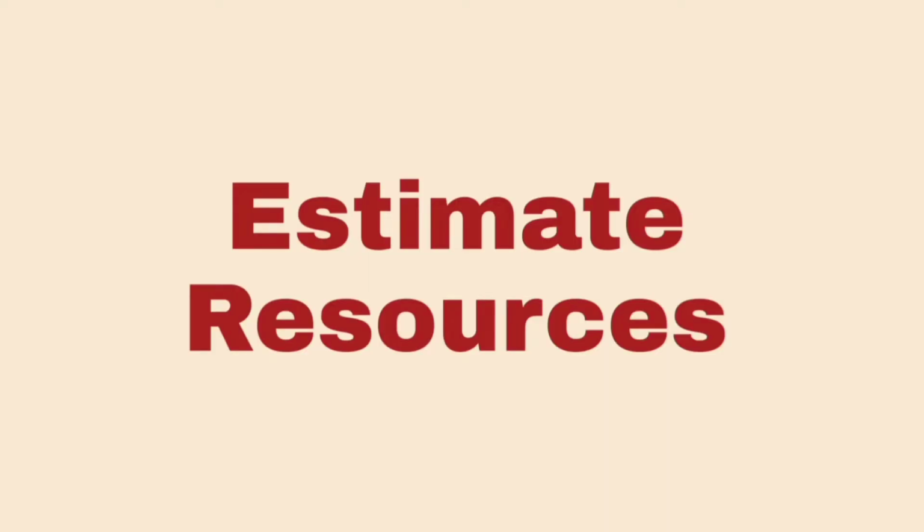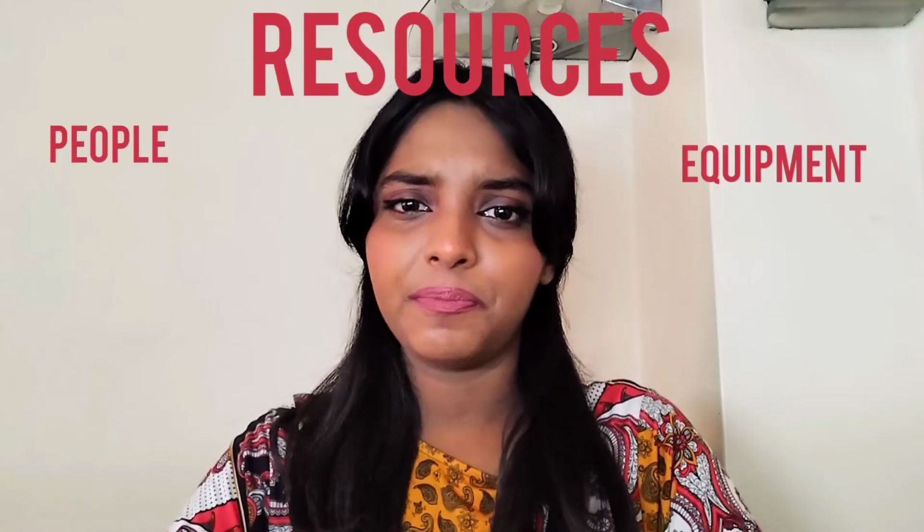Estimate resources. Resources are people, equipment, places, money, or anything else a project needs to be executed. As a result, resources may be allocated for each activity on the to-do list. Before you can assign the resources to the project, however, you need to know their availability. Some resources need to be scheduled in advance and may only be available at certain times. For example, a room for a kick-off meeting or a rented office. It is therefore essential to know this before you can finish programming a project.